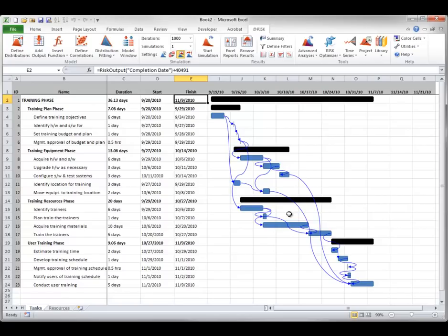One of these is the probabilistic Gantt chart. A probabilistic Gantt chart shows, by default, the earliest, 10th percentile, and expected start date, and expected, 90th percentile, and latest finish dates for project tasks. It is shown in a format similar to the Gantt chart you see in both Microsoft Project and Excel. To display this chart for a simulated project, you select Probabilistic Gantt from the Charts and Reports group in the Project drop-down list.